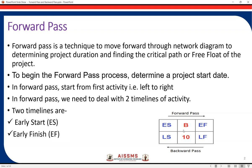Here B is the activity name, or we write the full description about the activity here. This 10 is the duration of the activity — how much time the activity is going to take to completion. There are four more fields: the first one is ES and the second one is EF. In the first row, these two fields we are going to complete in the forward pass.